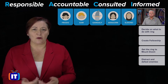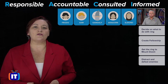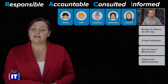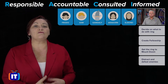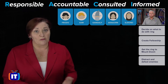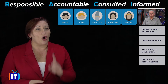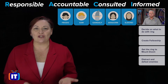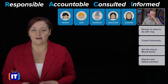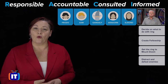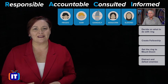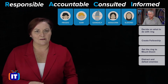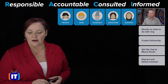Accountable means the buck stops here — it's the person who ensures that something happens, not necessarily the same person that actually does the work. That's the responsible person. There can be more than one responsible person, but only ever one accountable person. Consulted is somebody whose opinion we ask, and informed is somebody who is told about that particular activity. Let's jump straight in.